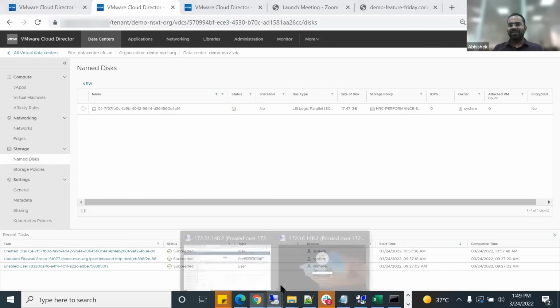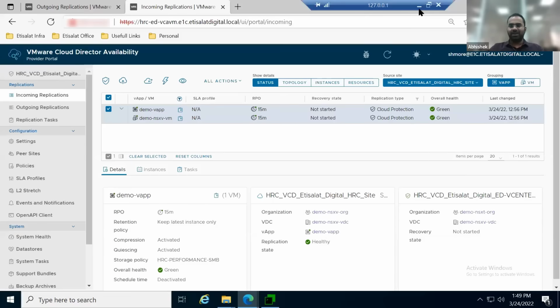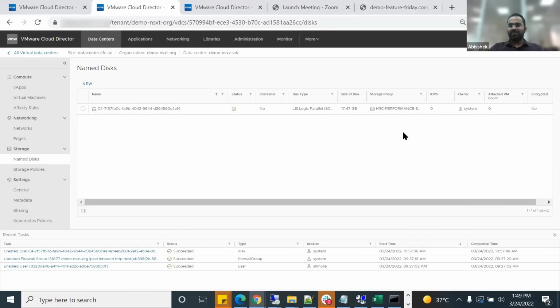So on that basis, if I can comment on that front, we have experienced a lot of customers who have their test environment also. So we usually test them, and then only we actually touch their production environment. This is a strategy by which we are getting the confidence from our customer also, that yes, everything goes fine for their test and dev environment, and then we can go with the production vApp. Got it, yeah.